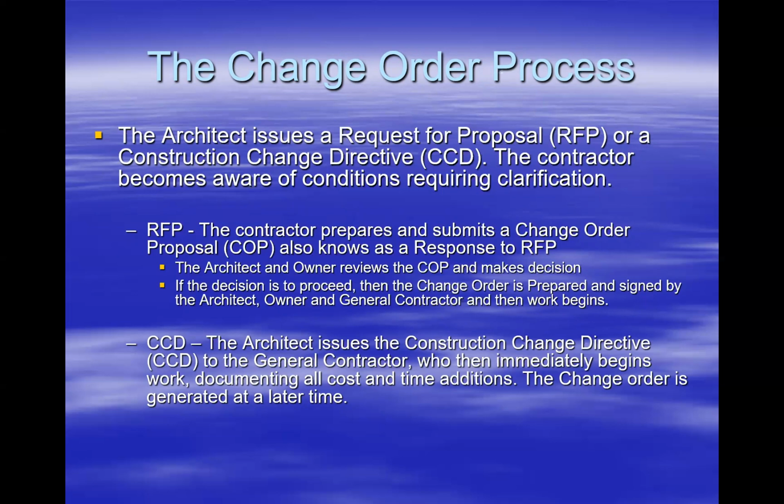An RFP, first off, is a request for proposal. Usually if you get a request for proposal during the course of a project, what's really happening is it's a major change to the project. And this major change, we'll use an example.